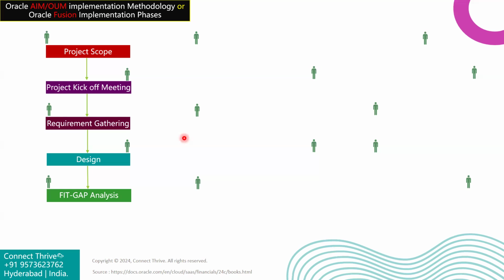So whatever additional requirements they have given, if we couldn't map them at the current phase, we will consider those as a gap. We have to send a mail to the respective module business user and get it approved. Only then will we skip these in the current implementation, either wave one or wave two. Post go live, we have enough time, and there we will focus more.